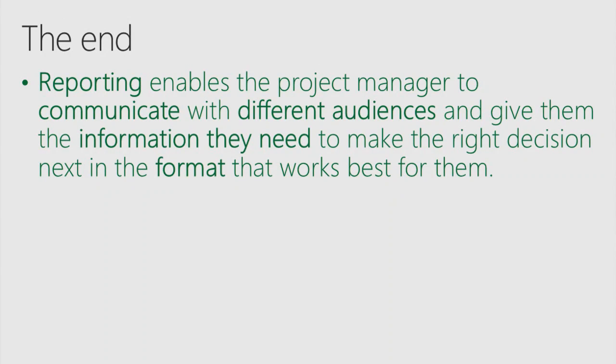Okay, yes, sir. I found out that you need to expand all the sub-projects to make them visible in the reports. Yes, so the valid comment was that, of course, you need to expand all of the sub-projects in order to get that data into the reports. But that's not unlike making sure that there are no filters applied before you do something else.